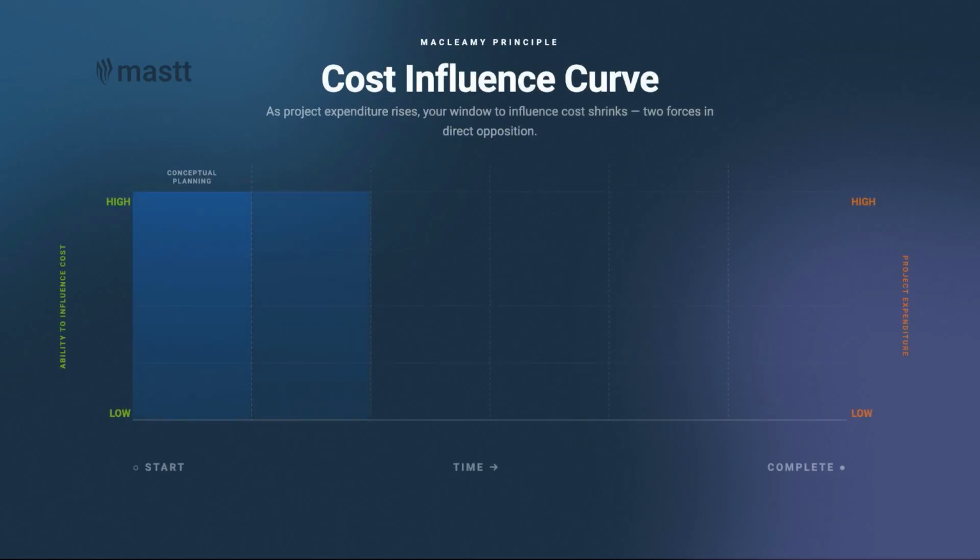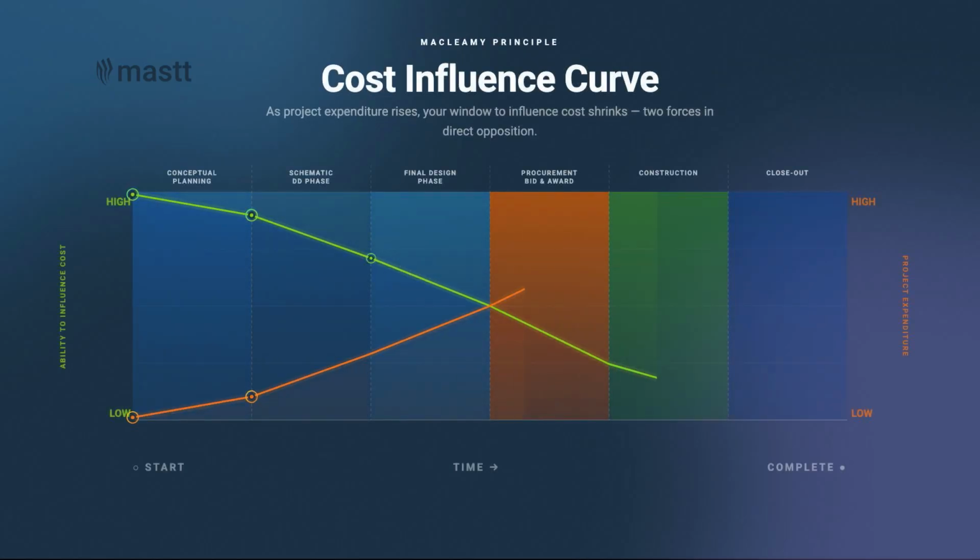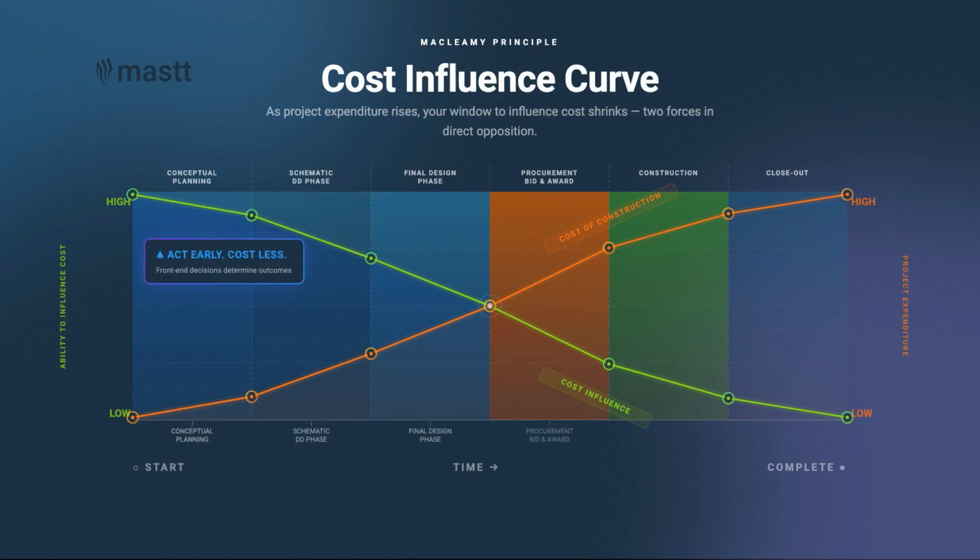Yeah, there's some great charts that show that, like the ability to influence the total cost of the project is highest right at the beginning, and then basically diminishes to almost zero as the project continues. Yeah. And you're running with all your consultants at a much higher cash flow, so stopping and starting is not so easy. So, and then once you complete the procurement phase and you start actually tracking the costs.